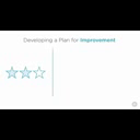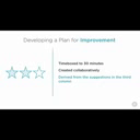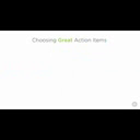As the final step of the retrospective, we'll take 30 minutes to work together to develop a specific plan of action to further improve how we'll work as a team in the next sprint. This plan will be comprised of action items based on what's currently in the third column." "And that's a great explanation of how to develop the plan for improvement," says Alan, "but I'd like to add 2 additional points of consideration for the team.